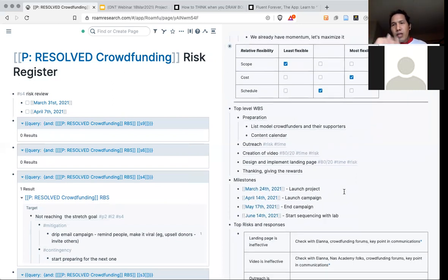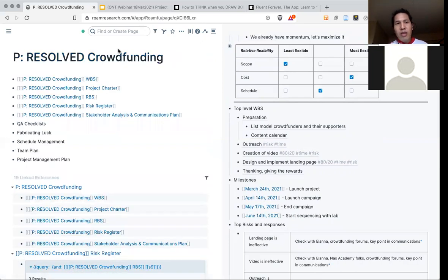So meaning when I change this, I will also redo the planning. I will go back to the risk, go back to this schedule, so it will change the project. It will cascade to all the other aspects. But just go to each section here, and that's it. So now the project is different. How will these change? So you have a systematic way of updating the project based on how the charter changes.